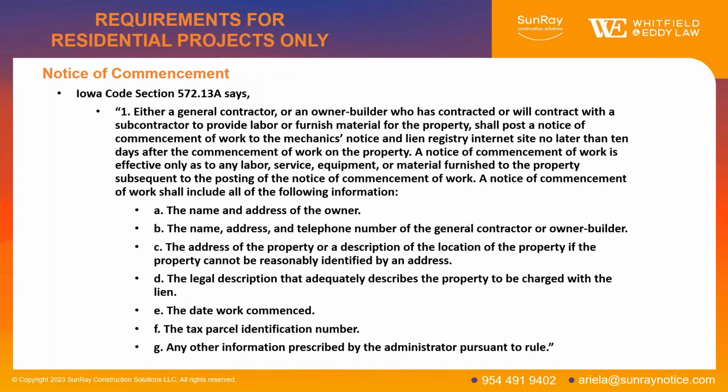Okay. Second notice requirement, and this applies to general contractors too, is a notice of commencement. Now, this is not something you put in a contract or just separately give to an owner. You have to go to the Secretary of State's website, and they have a form you fill out and file right on there.